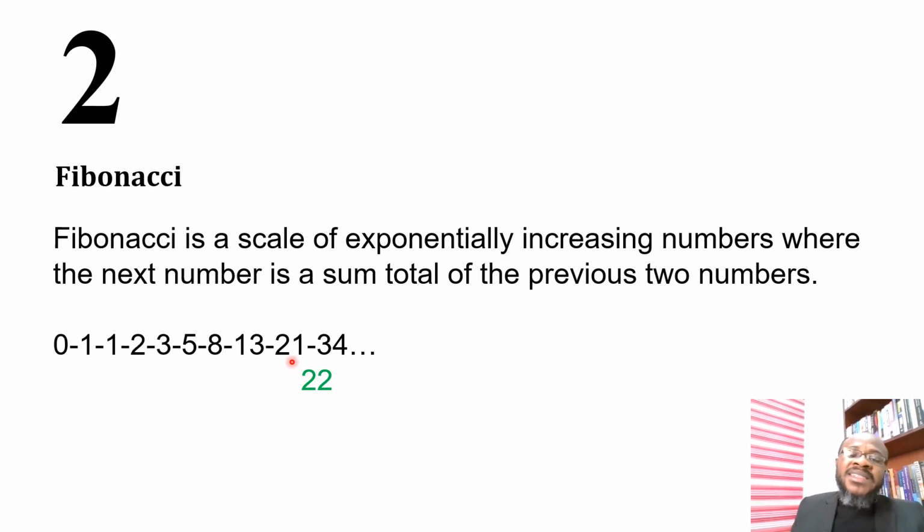Okay, but by assigning 34 to a user story and 21 to another user story, there is clarity in perceived difference. It's quite clear, and people are able to tell the difference between the two. So as a matter of fact, the perceived difference between 21 and 34 is equivalent to the perceived difference between 13 and 21, even though their real number differences actually differ.